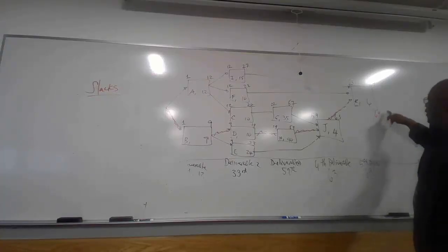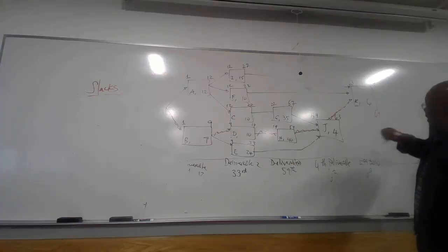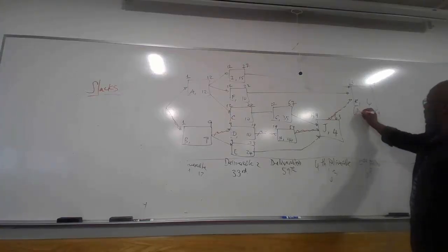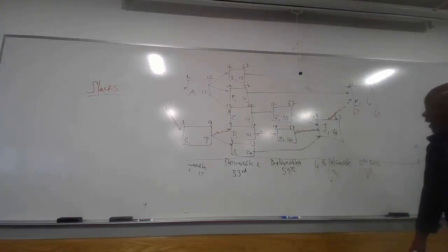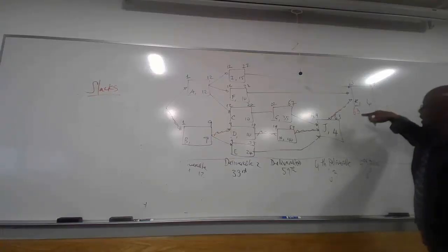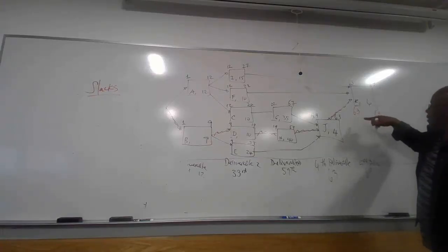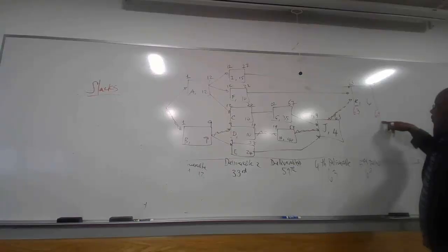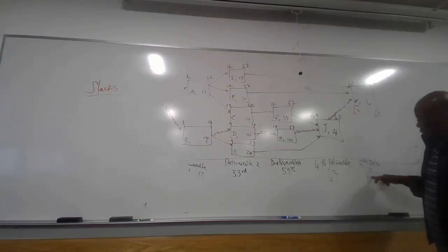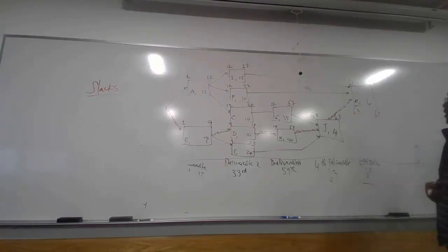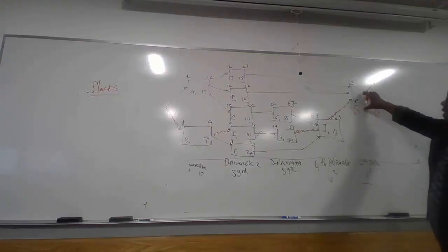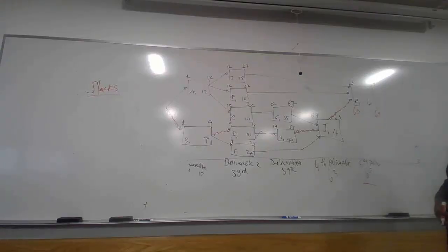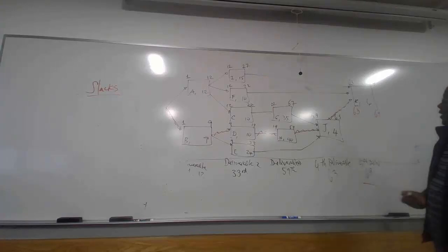And this, we're going to minus 6. It will be 63. So in other words, we should start this activity on the 63rd week and complete it on the 69th, where we have our last deliverable. So we cannot delay this activity. It has to start on the 63rd.